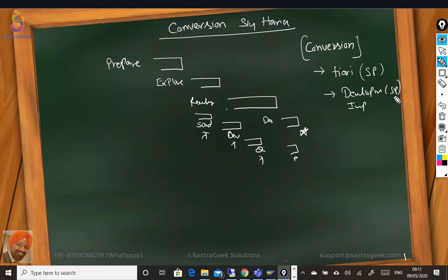So first sprint conversion, second sprint mandatory go-lives, third sprint introduction of Fiori applications for order to cash or procure to pay, fifth sprint development of Fiori, sixth sprint then go ahead with further Fiori applications for finance or other modules, go live with those Fiori applications, then adoption of DDMRP, adding EWM, adding TM. You can keep on doing your sprints and improving your system, improving your platform.